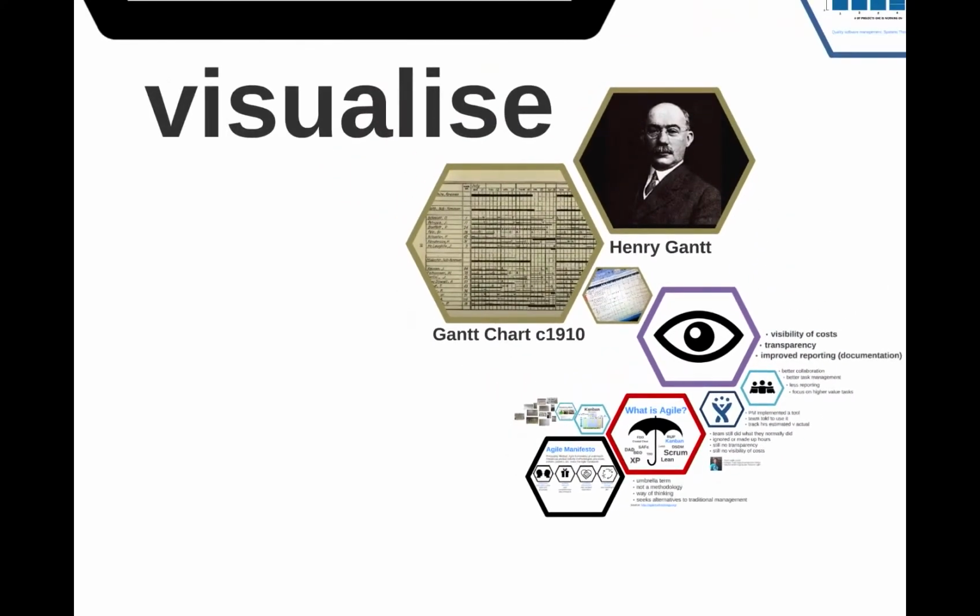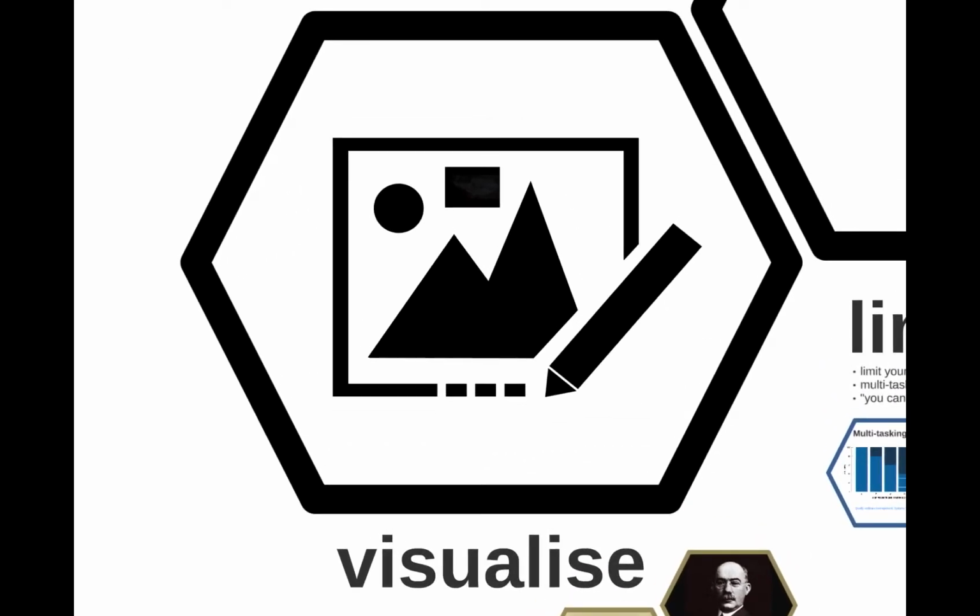So that's visualizing work. And what I remind teams as they start getting started with Kanban is that there are many, many ways to visualize work. If you choose a tool too early, the tool will always constrain the way that you work. Better that you start off, if you're co-located in particular, just visualizing stuff. And then as you improve, find a tool that meets the way that you've decided that you need. In fact, this team has already changed their Kanban. They've been together for 2.5 months. They've changed their Kanban about 4 times already.